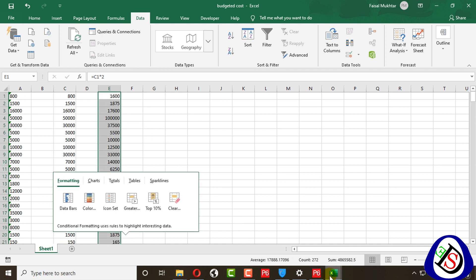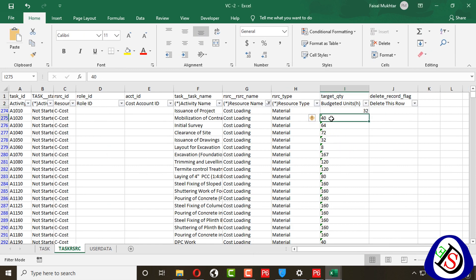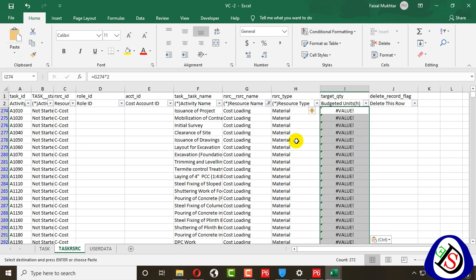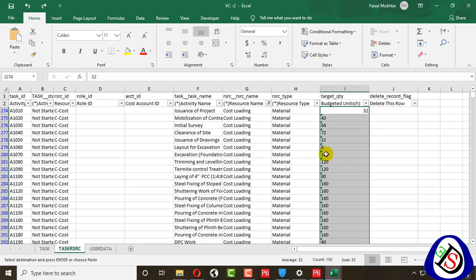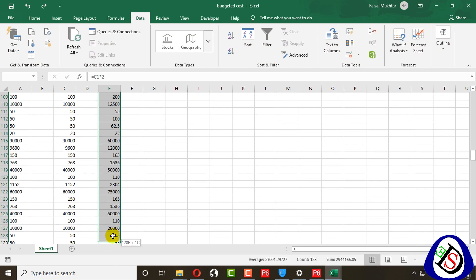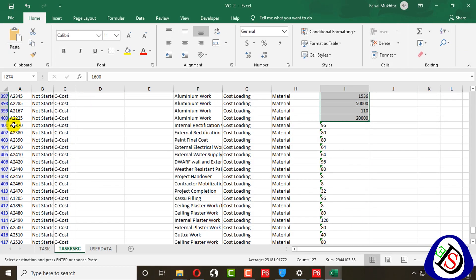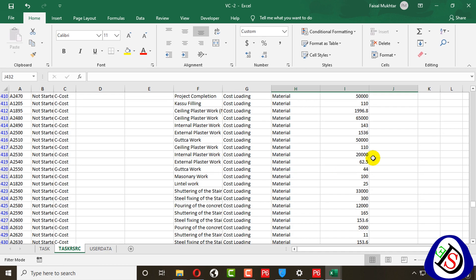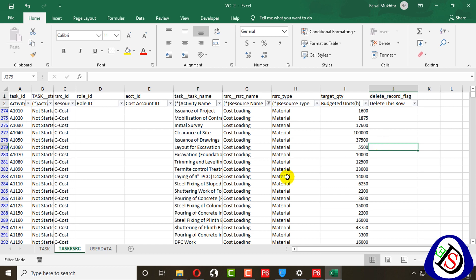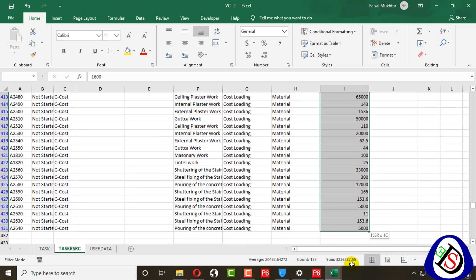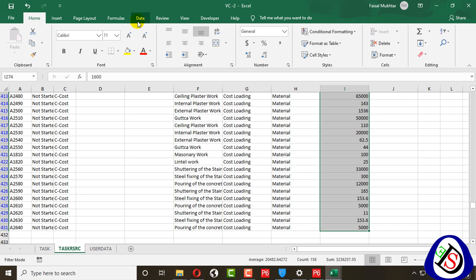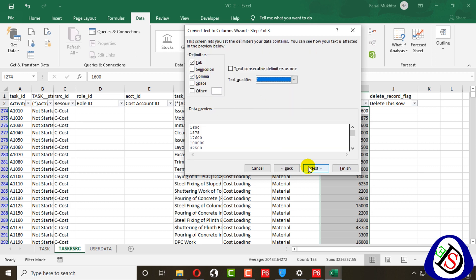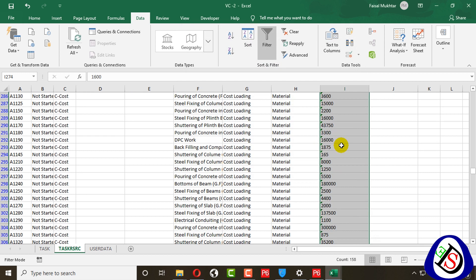I have cost values ready from the BOQ and I enter them in the Budgeted Units column for the cost loading resource. After adding all cost values, I select the column and use Data > Text to Columns, choose Delimited, select Comma, then Finish to convert the values to number format. I save the file with Control+S.